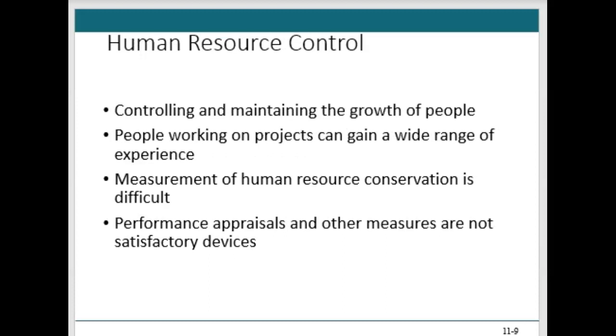Human resource control is another aspect, right? We want to grow and develop our people. We mentor, motivate, coach, guide, lead, and discipline, right? We even do conflict resolution in terms of human resource control, right? A tool that you will use and that you could research is called the Staffing Management Plan. Through the Staffing Management Plan, you will document the level of skill that you need on your project, right? You don't want all top principal technologists or all top project managers. You want a mix of them that are needed to get the job done, because you will pay much more for others. But realize, as I have a PM level 4, a 3, a 2, and a 1, that I'm going to have some human resource control issues that go along with that. So be aware of that.